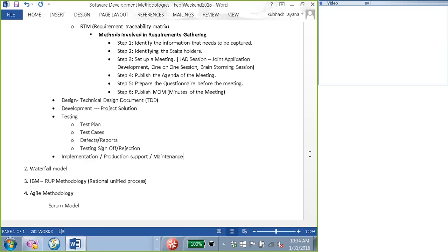However, as you said, there may be a situation where there are too many defects. For example, if a few developers have done a poor job and have not implemented the code properly, a lot of defects are reported and it may take more than the estimated time to fix them, which may impact the project timelines. That may also happen, which is not good for the project though.